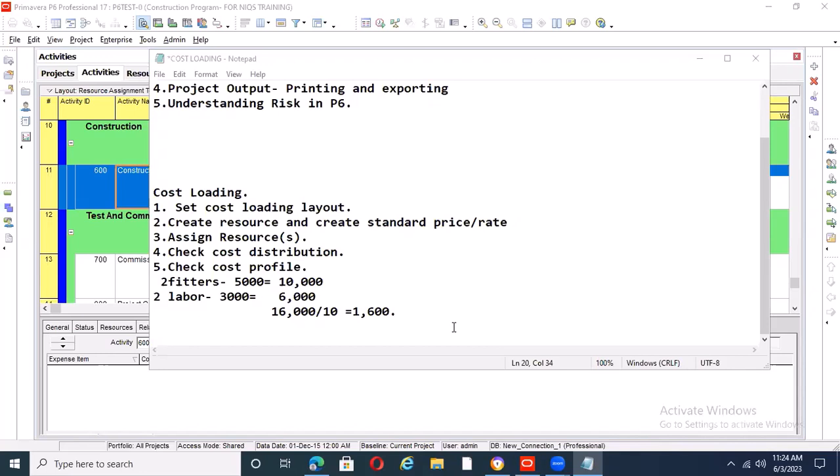You have to break it down one after the other. So my advice is, if you have such an activity in your BOQ, use it as a WBS. Create that line item on the BOQ as a WBS. You can say excavation works. Then under excavation, you have a sub-activity that is earthworks, right? Earthworks. So that one, now you can start breaking down your substructure works.